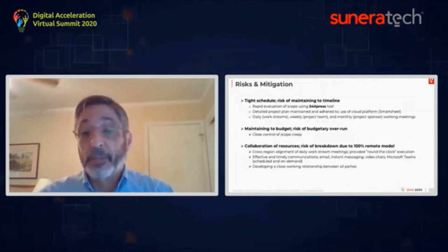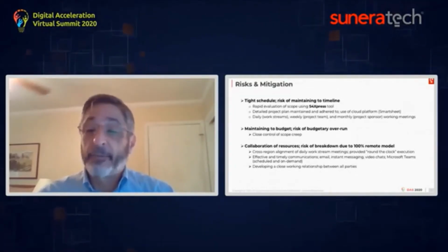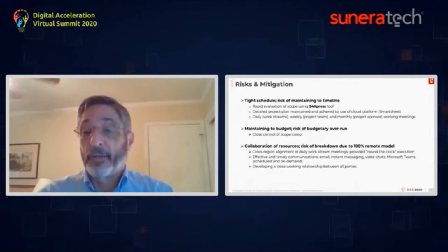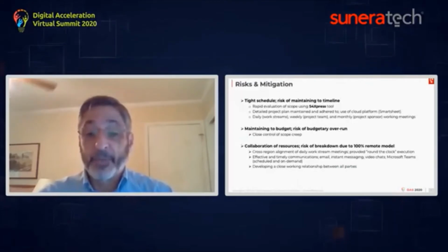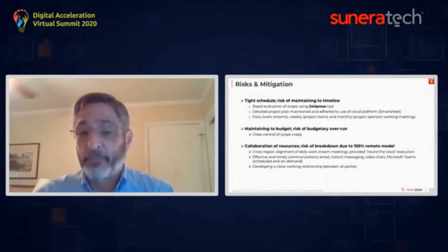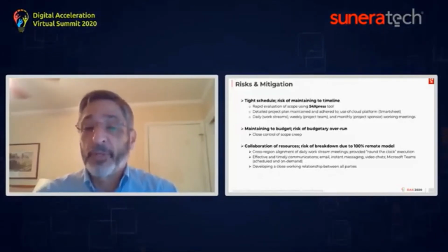The other risk was the ability to maintain good collaboration of the resources. We had the Sunera resources in India, myself in the US. The client had resources in the US and Canada and Germany. So just the time differential was a risk. But through the daily workstream meetings, using instant messaging, video chats, Microsoft Teams, and ensuring that we had very efficient and timely communications when any issue came up, we were able to make that work with a 100% remote model, 100% within the scope that was expected by the client. It was delivered on schedule.